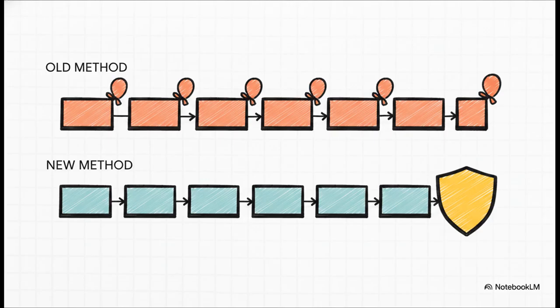Just think about how we traditionally estimate. Every single time a developer gives an estimate for a task, they bake in a hidden safety margin to protect themselves, right? It's human nature. Nobody wants to be the one missing a deadline. But when tasks are scheduled back-to-back, all those hidden individual safety margins accumulate and artificially inflate the entire schedule. Add in our resource constraints, which, remember, already bumped us up to 42 days, and you have a horribly bloated project timeline right out of the gate.